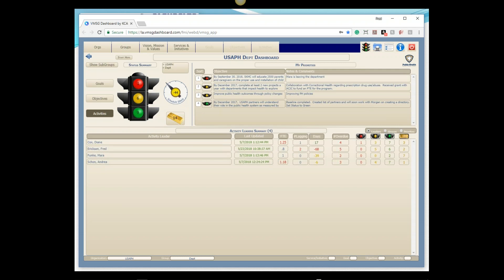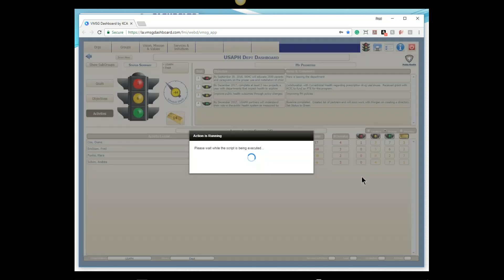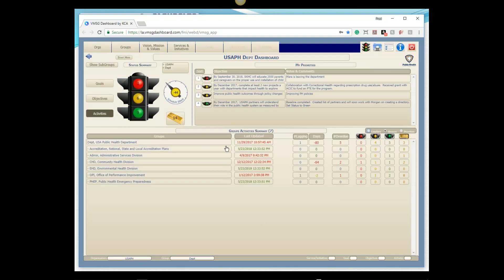You can click on Diane's name to see every activity she's been assigned to and say, 'These two are in Fred's skill set — I'll reassign those to get him up to 1.0 FTE and Diane back down to 1.0.' The dashboard also shows lagging days — activities calculated to be lagging by schedule — color-coded by how many days, plus days ahead or behind schedule, overdue items, and the red/yellow/green/gold status for each person. If this were a large department, you'd have a full screen of people to scroll through. You can also view by org chart to see how each division, bureau, office, and program is doing against their plans.